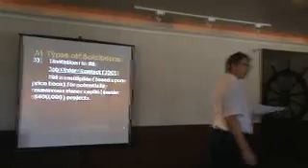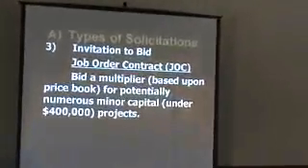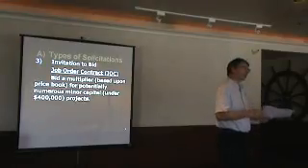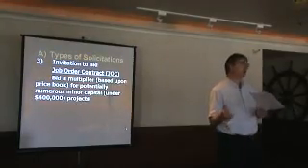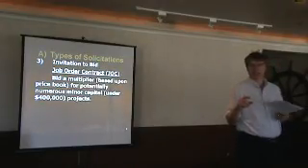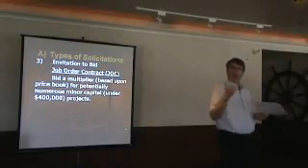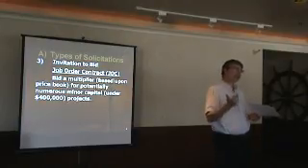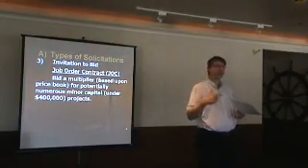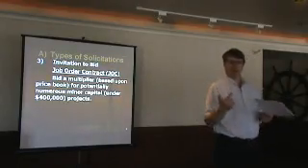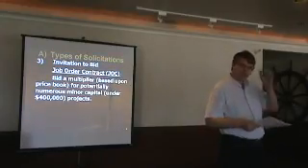JOC, or job order contract. There's a lot of minor capital projects on campus, meaning projects under $400,000 that need to be done. It could be something as simple as signage or sealing a road or building out classroom space, but each discrete project is under $400,000. That, number one, meets the requirement, it's a minor cap project. And number two, that our in-house workforce elects not to specifically perform, because our in-house shop has first rights on that. If those two things occur, then we can do the work as a JOC.